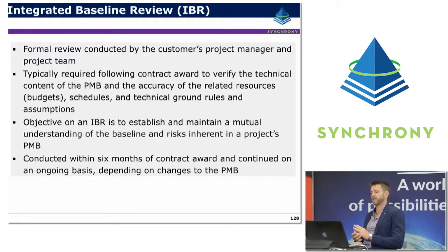It usually happens following contract award, and it's about verifying the technical scope of the PMB and the appropriateness of it, the accuracy of resources, budgets and schedules, and the ground rules and assumptions that have been baked into that plan. So the objective of an IBR is to establish and maintain a mutual understanding of the baseline and the risks that have been inherently incorporated within that PMB.